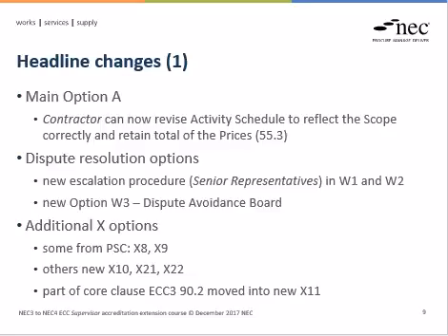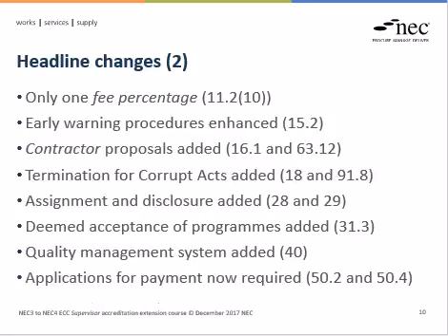And then part of the core clause on termination, clause 90.2, has been moved into a new X11, allowing the client to have termination at will. Unlike the NEC3, which had 2 fee percentages, we've now reverted back to just 1 fee percentage.